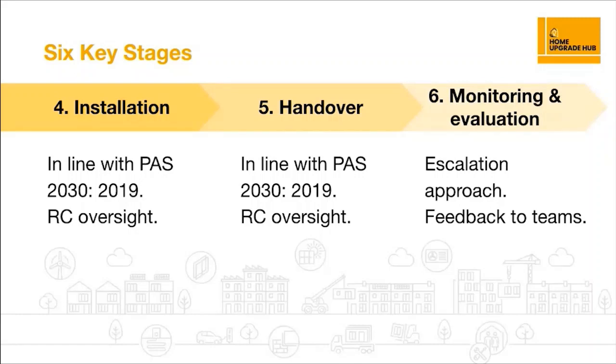So stage 4 is installation, and you'll see that this is a key role for the retrofit coordinator as well, and not just the installer. So they're responsible for realising the design, and they've got control over when things get swapped out, when things happen, the sequence of things, and also ensuring that there's that communication between members of the team.